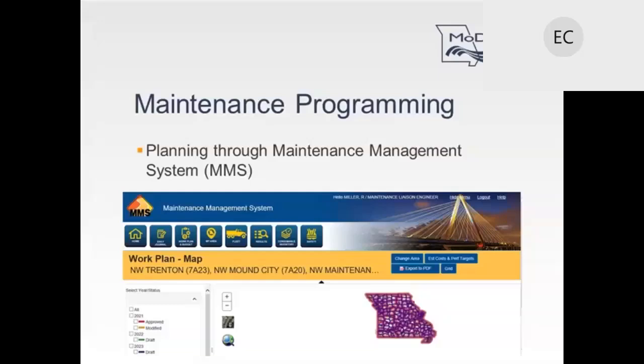That's right. We look at it on a program basis, though. We'll review all the projects, but we look at them as a whole for your whole program of what's rolling from one STIP to the next. Right. Some may go up, some may go down, but in totality, your total district program can't grow more than 3%. Right. Okay, thank you for your answer.